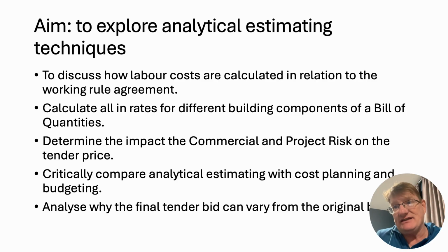So we might do a cost estimate based on the functional floor area or the gross internal floor area, or an elemental cost plan with elemental unit rates, or an elemental cost plan with approximate quantities, from which we will then be able to produce a budget, usually based upon things like SPONS or the BCIS database, the Building Cost Information Service database.